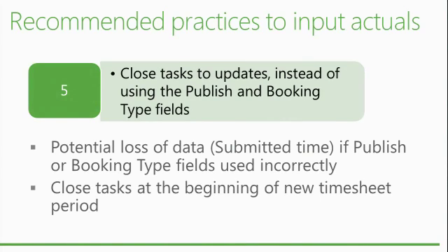Regarding closing the task, it's a good idea to wait for the previous period to end and to close the task at the beginning of a new timesheet period, to avoid any confusion for the users and any problem that could happen as well.